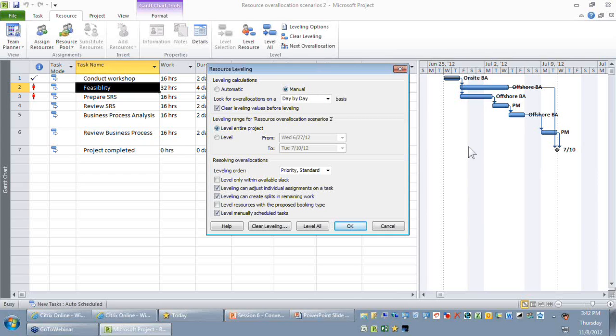If your plan is a bit dynamic, or you are progressively elaborating your plan, maybe you might have clarity only for the next 3 weeks, so who is going to do what. Maybe for the remaining weeks of your project, you may not have clarity about which resources are working on which activity, and you would have assigned resources just for accountability purposes, but not for responsibility.